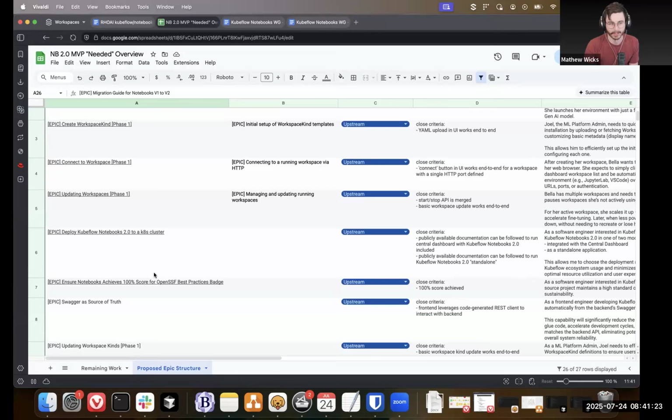There is the ability to do Gantt charts, I believe, in GitHub, or we could do it somewhere else. But my poor man's thought, and again, I welcome feedback from the community here, I'm not pretending I have this as a solved problem, is just to add a different kind of epic in focus label. Right now we're probably going to have 7 different epics labeled as in focus, but ideally in a healthy state, we should only have 2 or 3 of these in focus, and use that milestone doc we have to delineate the actual order of these.